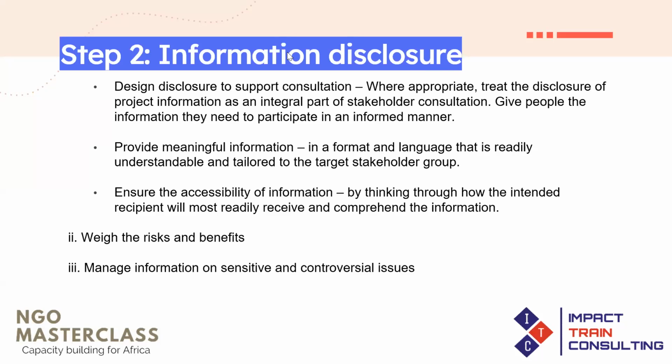They should have signed a consent form, giving you their consent to share their information on your materials and use them to publish and so on. But even at that, even when they give you consent, you also still need to protect their identity, especially in projects that are very sensitive and have a lot of stigma and cultural biases around them. So that's just my advice.